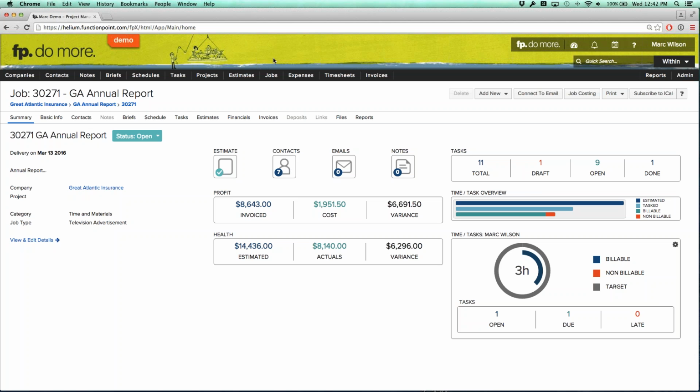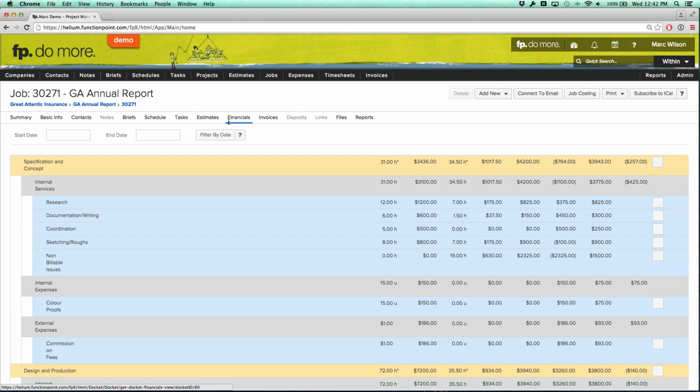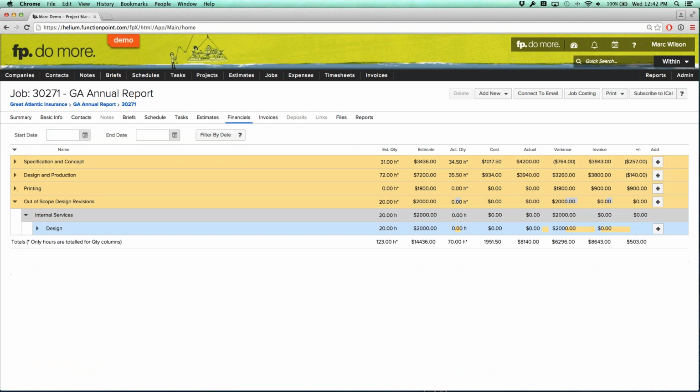So if you bill something based on estimated values and you want to continue doing so, then maybe a scope of work revision to the structure is applicable. If you don't want to do that and you want to just track time and bill for the time, then change the category structure to time materials and just start to bill for timesheets moving forward.